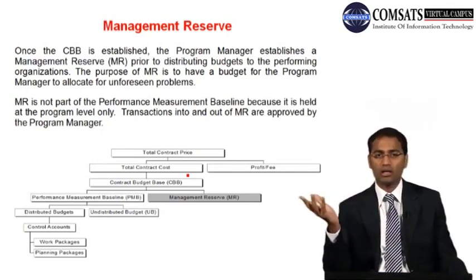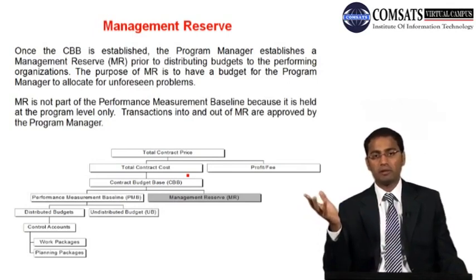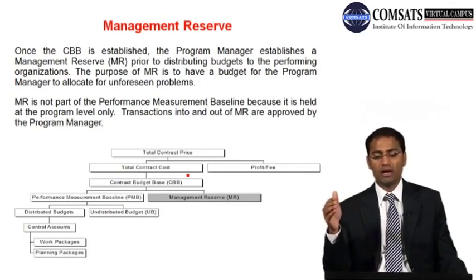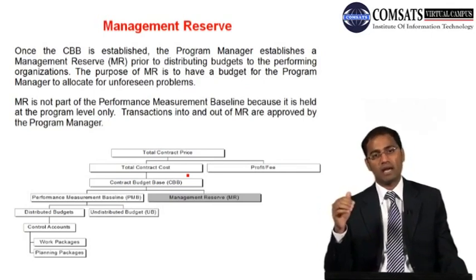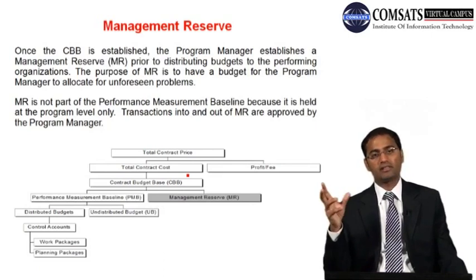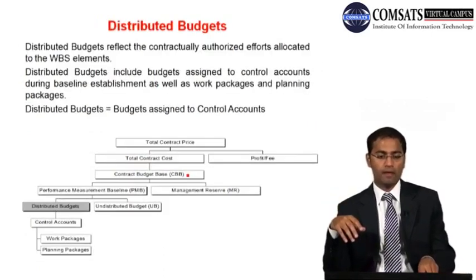Again, MR is not part of performance measurement baseline because it is held at the program level only. Transactions into and or out of MR are approved by the program manager and not by the project manager. So this is the concept of management reserve.